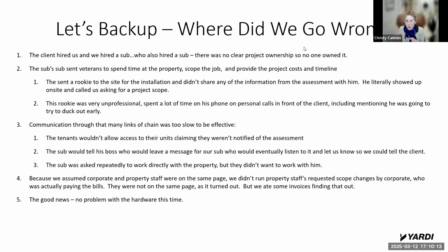But for that poor guy, and in some ways I feel sorry for him, he showed up on site for the first day and called Yardi and said, hey, I'm here. What am I installing? What am I supposed to do? And we were like, what? Your company did the site assessment and the speccing and created the bill of materials. We ordered and programmed what your company told us to do. Call your company and talk to them. Well, he did, but it took him a while to reach the right person. And so a whole day is gone at that point, right?